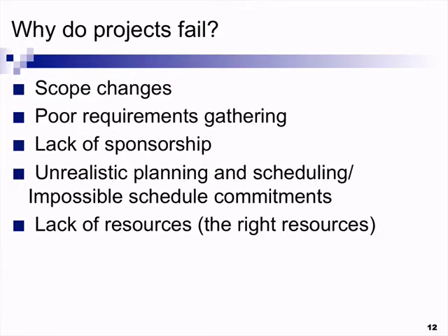Now, on the contrary, why do projects fail? Well, they fail to some extent because we have a problem managing the scope. For example, we start changing our hypothesis frequently during the execution. So whatever we have planned, the tasks we want to execute also have to change. The resources we assign also have to change. And do not forget that if in the middle of the project you change your whole hypothesis, maybe for a logical reason, you have already used resources. So your original target is changing. So one of the main reasons why a project fails is because we don't control the scope changes.